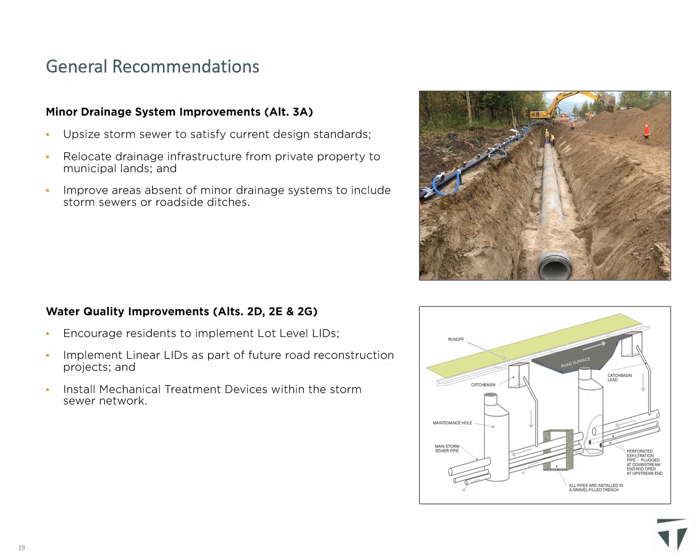Preliminary preferred solution. Following the screening of improvement alternatives as previously described, general recommendations were identified for inclusion in the preliminary preferred solution. These general recommendations generally consist of Schedule A or A+ projects and are pre-approved for implementation at the town's discretion, as deemed feasible, in conjunction with planned infrastructure renewal and road reconstruction projects as infrastructure reaches the end of its service life. The following general recommendations were selected for inclusion in the preliminary preferred solution.